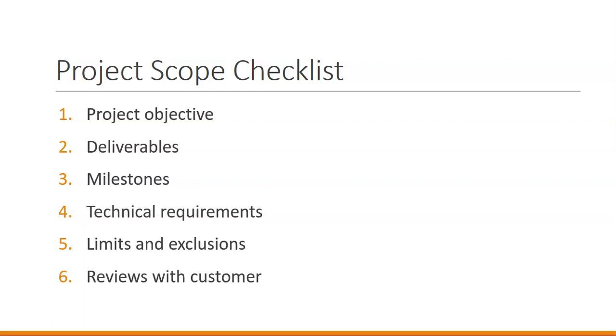Because if you don't have the team on staff to meet the technical requirements for a specific project, then you will have to go out and hire someone who does have those technical requirements, and that can add time, complexity, and cost to any project.